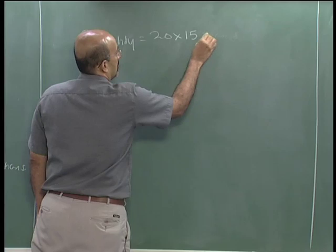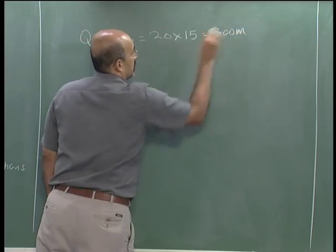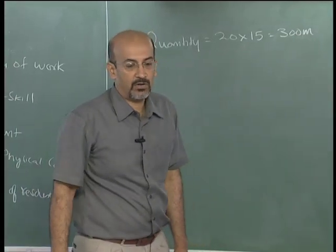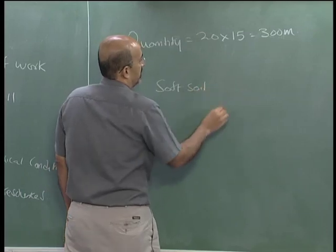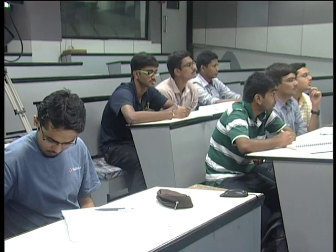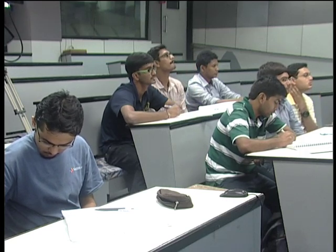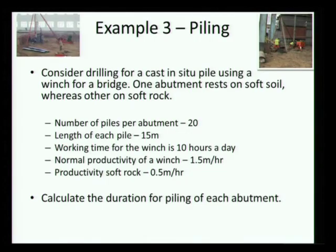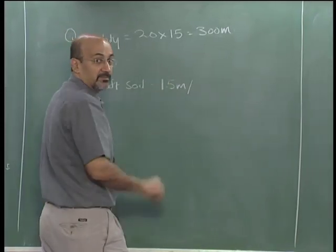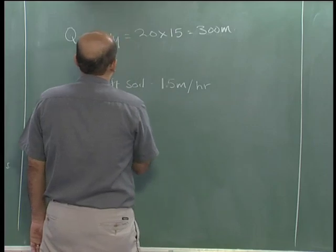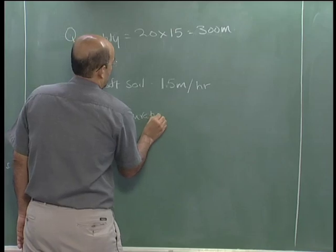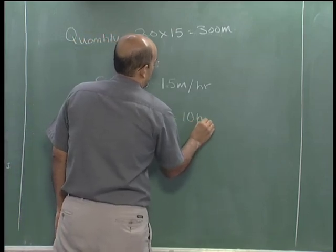So, 20 into 15 gives us 300 meters for one abutment. On the soft soil side, my productivity is 1.5 meters per hour. Normal productivity is 1.5 meters per hour. Working 10 hours a day, this comes out to about one day — so the duration is approximately 20 days for the soft soil abutment.